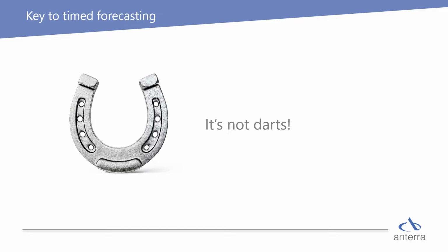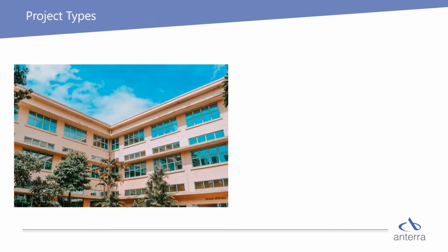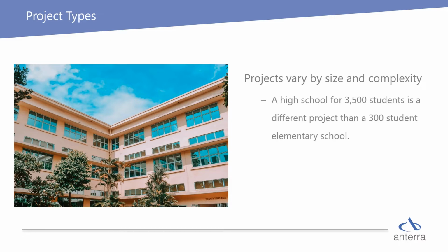Project types are important because you can build as many S-curves based on these types as you need. Let's use the example of building schools. You may need multiple project types for schools to account for elementary, middle, and high schools, or schools with multiple stories. In other words, longer duration and more milestones.